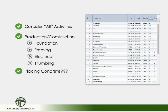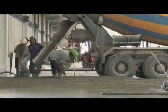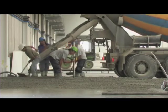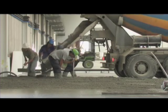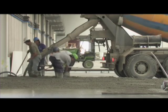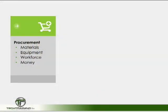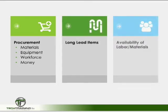We still have to be careful. Consider an item such as placing concrete — the placement itself may only take one day, but can we use the concrete the next day to set up equipment? Absolutely not. Concrete needs to develop strength. Therefore, the most important resource when creating a schedule is in fact time. The next item is procurement: getting the materials, money, equipment, workforce, and all other items necessary to construct the project, including long lead items and workforce availability.